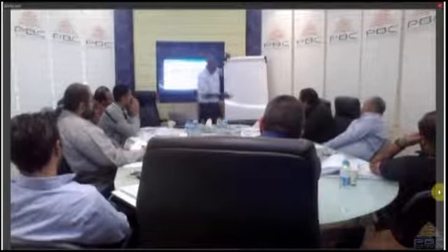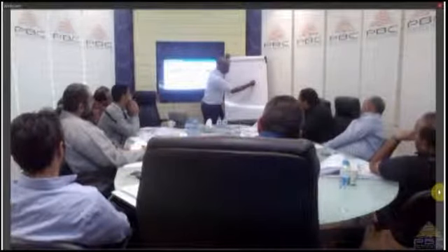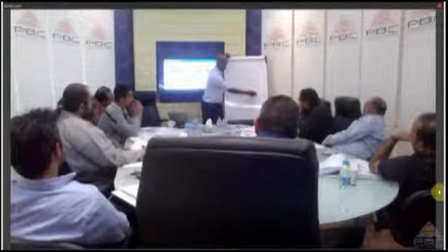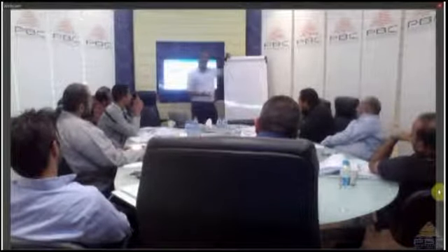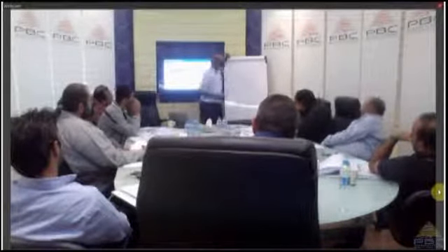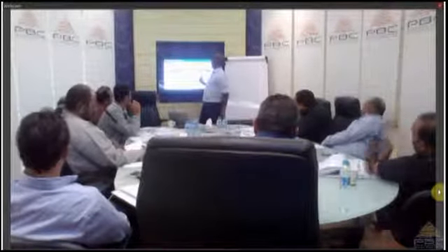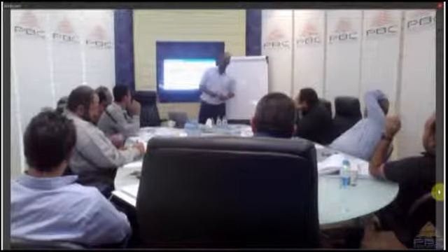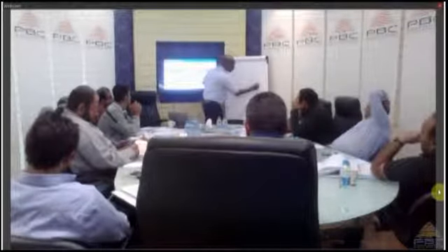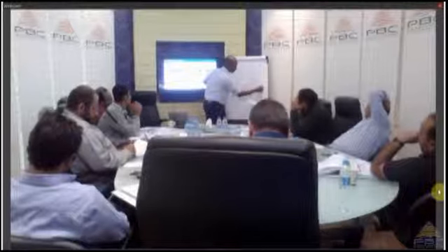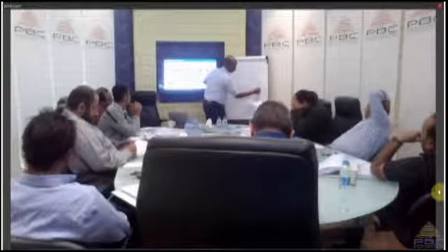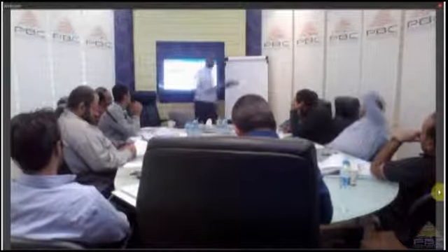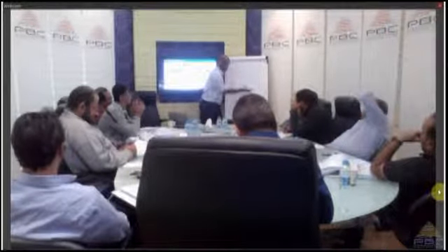So there's a gap between how much money they will have and how much money I need. This gap is called what? The project, what do we call it? Funding requirements. So it helps us in identifying the funding requirements of the project by looking into the difference between how much money we need and how much money we have.